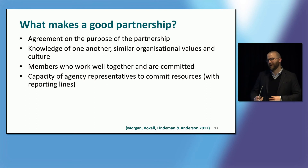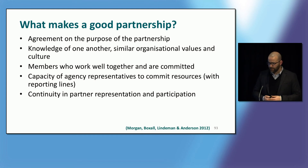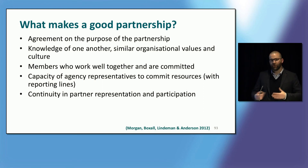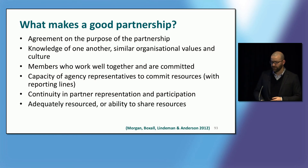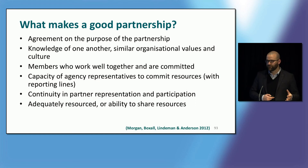Continuity and partner representation — you can't necessarily do much about people leaving positions and staff turnover, but having a contingency in place for any potential turnover that might occur throughout the life of the project is something to factor in. Being adequately resourced and the ability to continue to share resources is also important — will your partner be resourced to participate in the project for its duration? Particularly if they're providing funding to support infrastructure, will they actually be able to provide that funding? And if there's any information sharing, be really clear about the protocols around who can share what information.